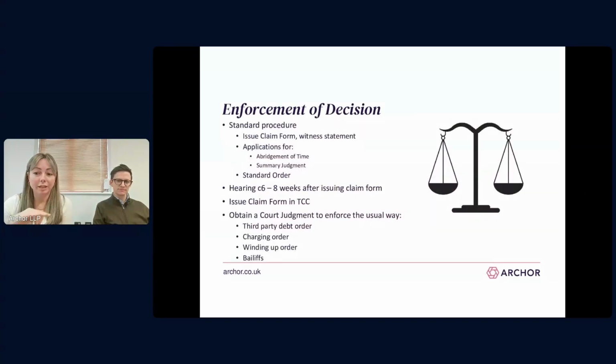I'm just going to really quickly run through this in the last 2 minutes that we've got. Enforcement of decision. So if you get a decision, perhaps the referring party has succeeded, and the responding party has to pay the referring party some money. If the responding party doesn't do that, there's a quick fire claims procedure in the Technology and Construction Court where the court will enforce that decision. So it's a very standard procedure. You issue a claim form with a witness statement and a couple of applications. You'll get a hearing probably about 6 to 8 weeks after you issue that claim form. It's all in the Technology and Construction Court.